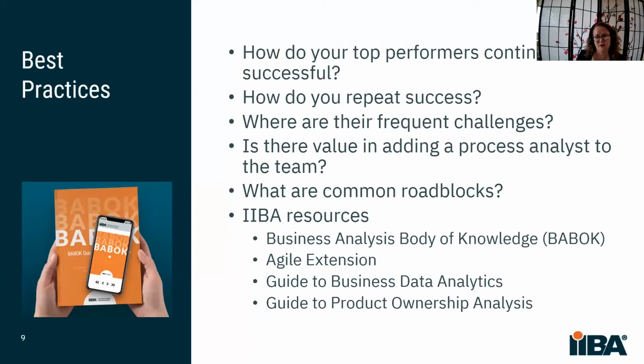Often it can be SME availability. SMEs have a full-time job. So when you're working on a project, even if it's to improve something for them, they have to somehow juggle helping the BA while at the same time still doing their work. So we have to be understanding about that, but it does cause some challenges in terms of trying to move work forward. The big picture is not always clear to the BA.